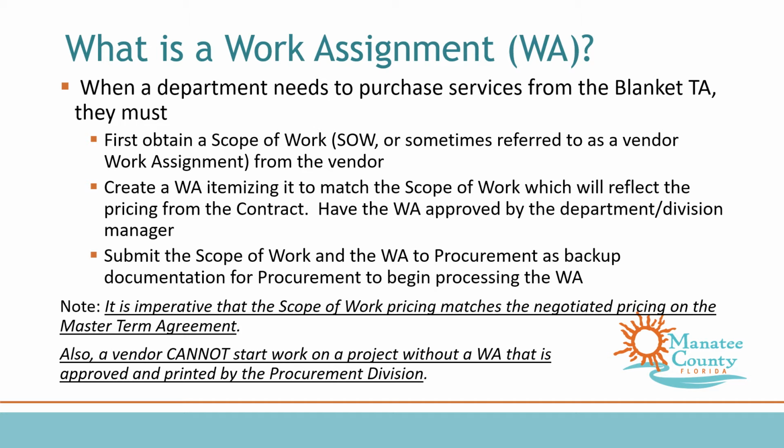scope of work, also known as a SOW or sometimes referred to as a vendor work assignment, from the vendor. Create a work assignment itemizing it to match the scope of work, which will reflect the pricing from the contract. Have the work assignment approved by your department or division manager. Submit the scope of work and the work assignment to procurement as backup documentation for procurement to begin processing the work assignment. It is imperative that the scope of work pricing matches the negotiated pricing on the master term agreement.